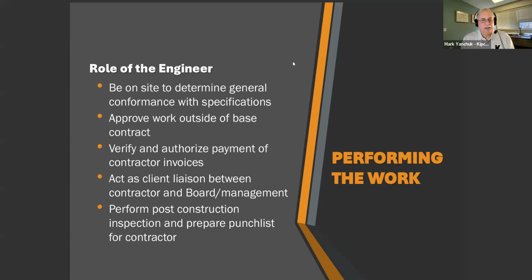The engineer is acting as a liaison between the contractor, the board, and the management company. When the roofs are done, the engineer will actually walk the roofs with the contractor and go over and prepare punch lists.